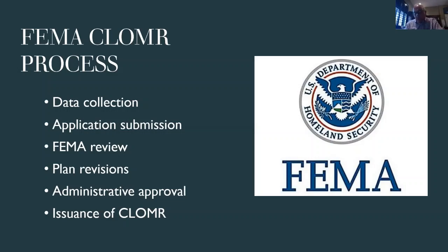Data collection, like what Mark and his team has done, is very extensive. You have to start with the actual data and analysis that FEMA has performed and used to produce the flood insurance rate map, also known as the FEMA map. So you start with that.